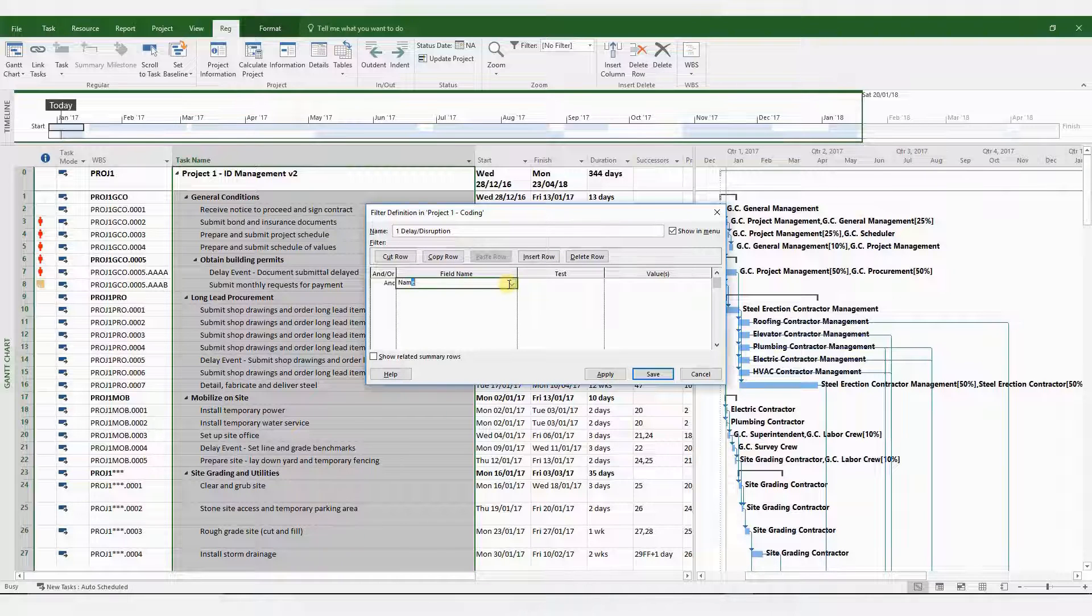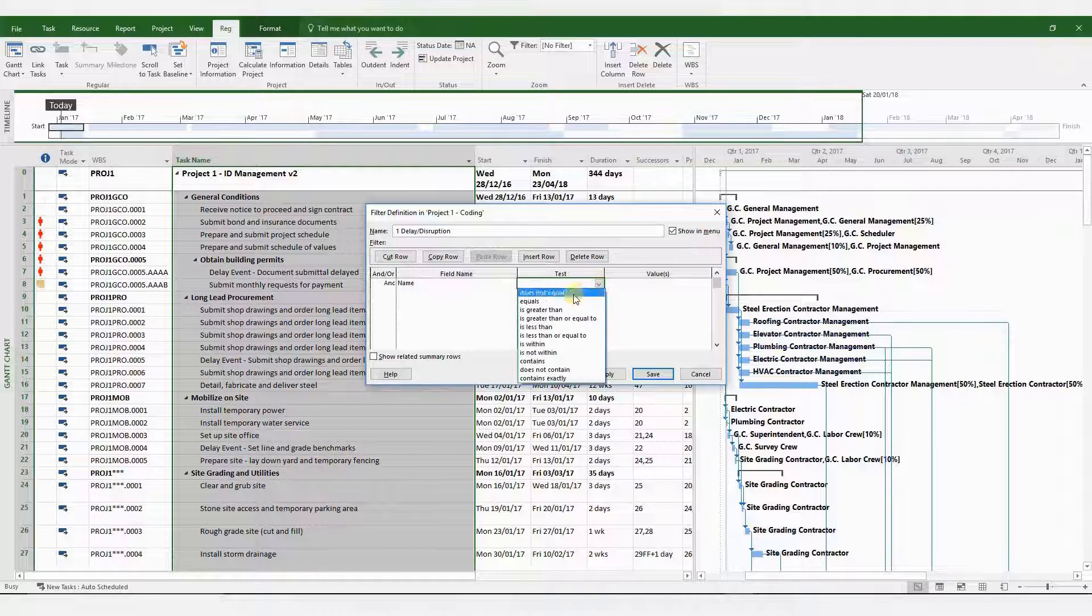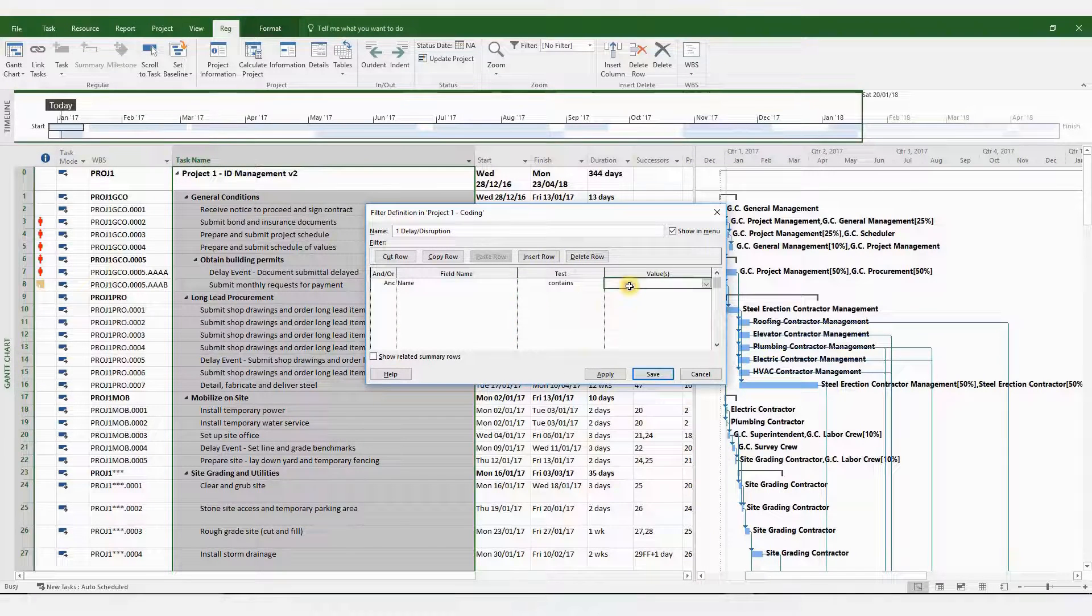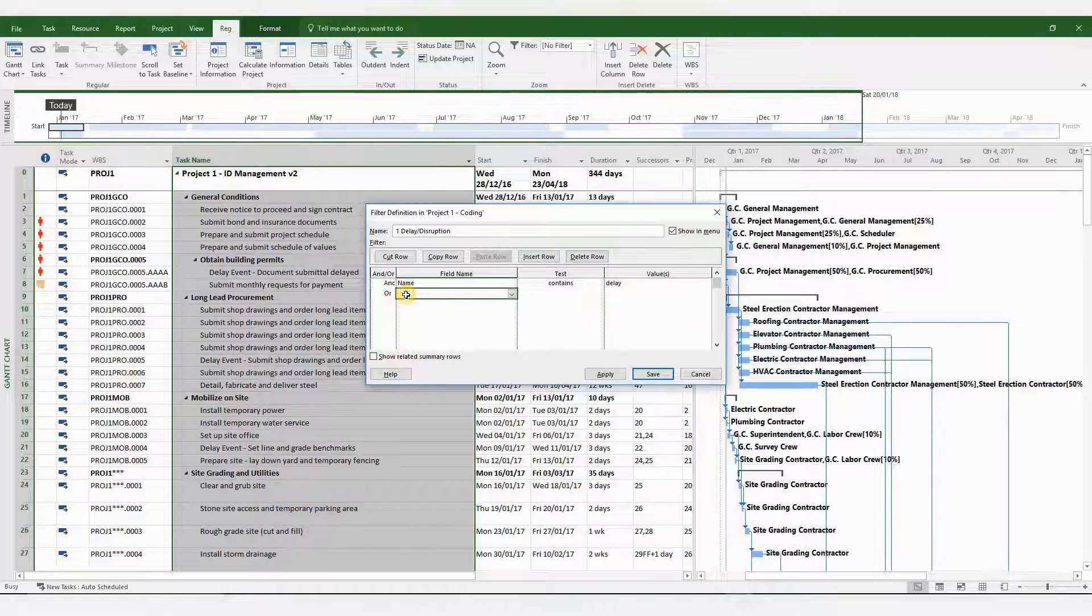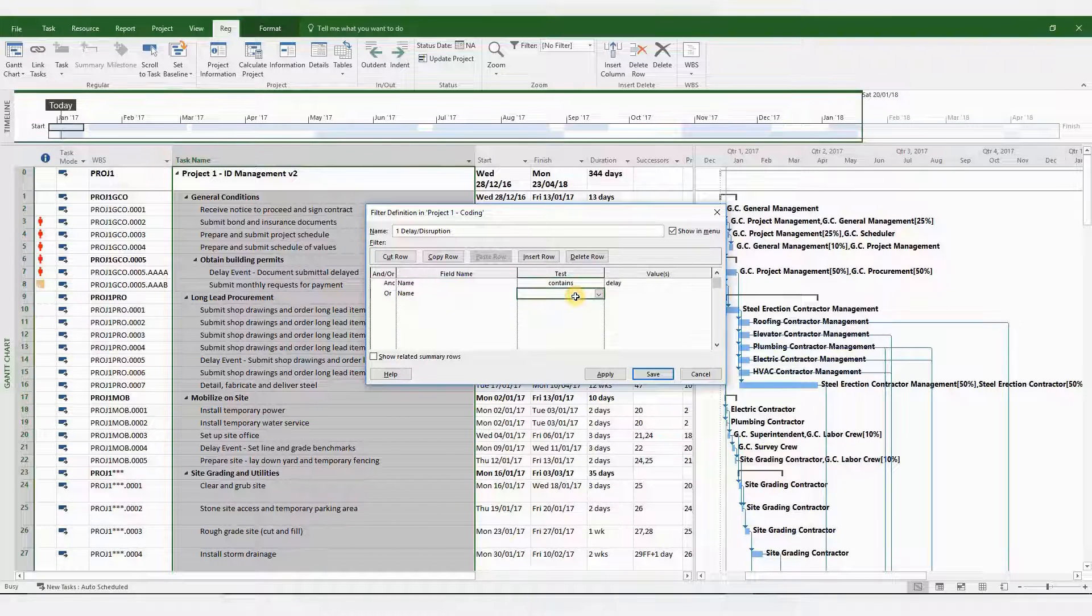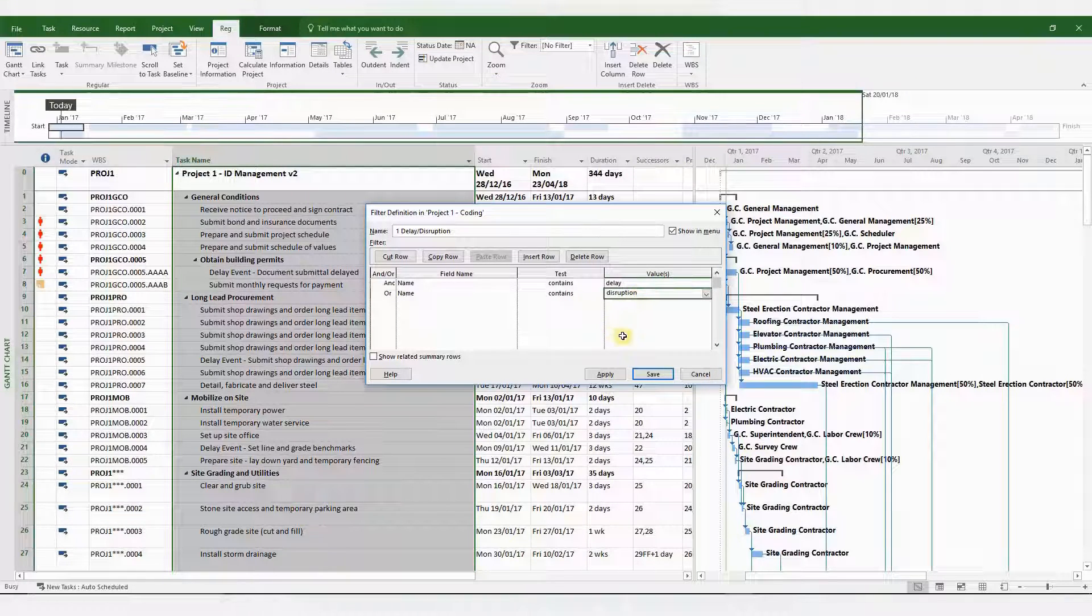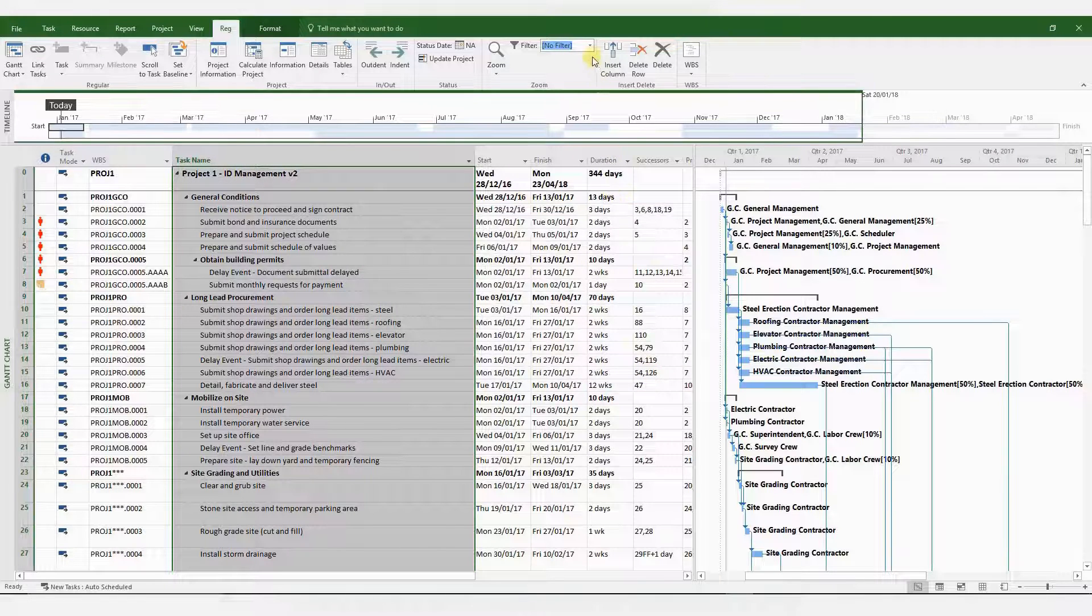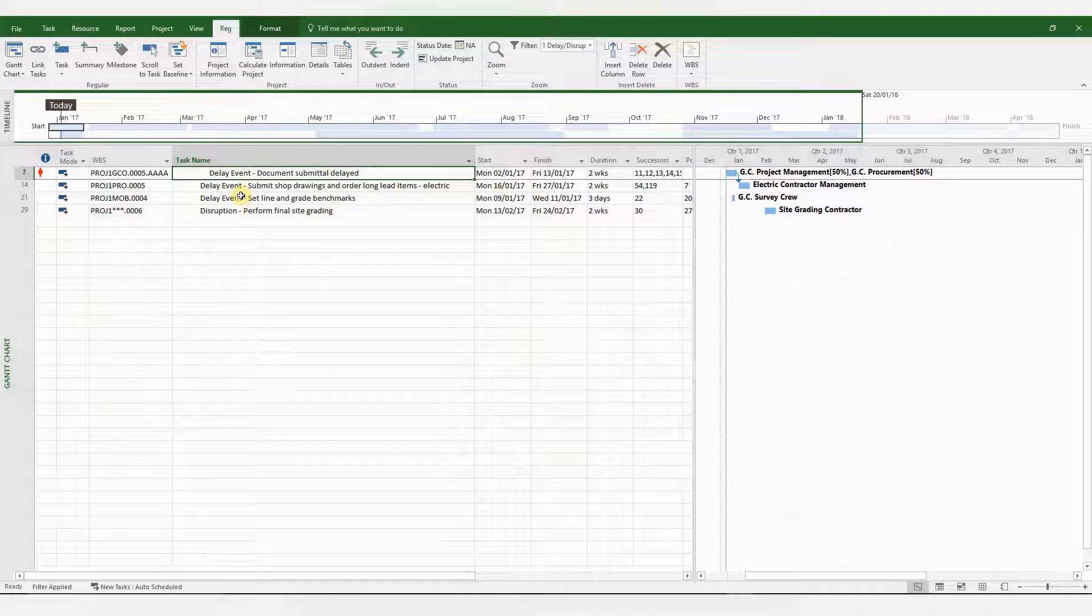So this is the way to do it. The field name is going to be name, which is the task name that you see there. And the test will be containing a text for delay or disruption. Click save. And now we apply this filter in order to look at all the delay and disruptive events. And here they are.